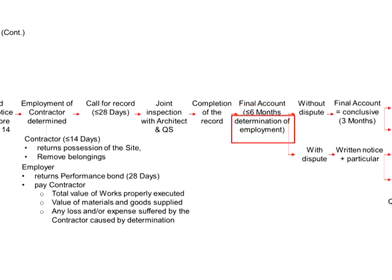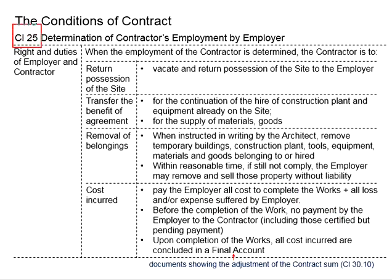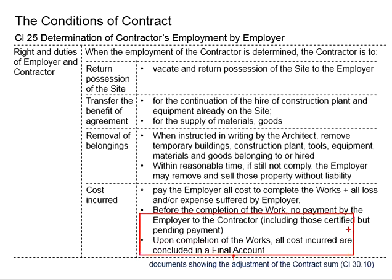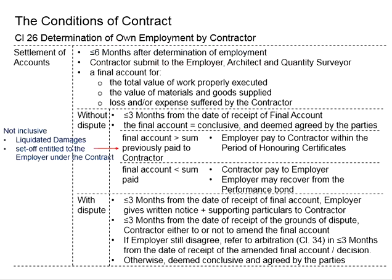In this case, the contractor does not need to wait until the completion of the work to have the amount settled. This is different from Clause 25, where before the completion of the work no payment should be made by the employer to the contractor. Under Clause 25, when the contractor is at fault, the employer will need to hire somebody else to proceed with the work until completion, and then the relevant amount is settled. However, under Clause 26, when the employer is at default, the contractor does not need to wait until the employer completes the work by hiring somebody else to have the account settled.